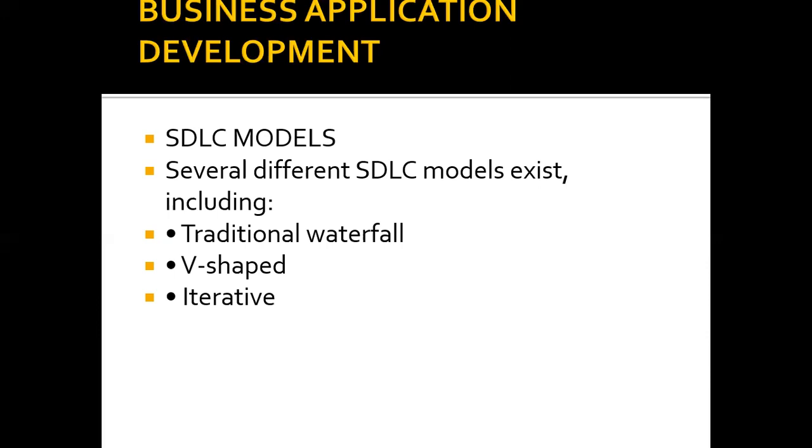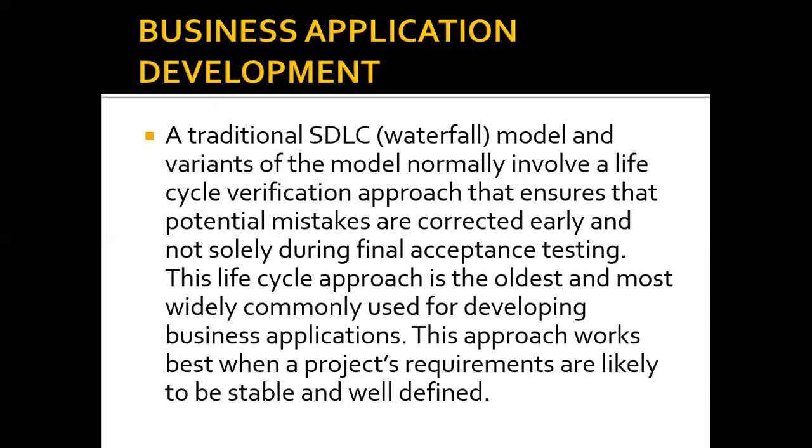All right, because the waterfall model basically works in an environment where there is stability of requirements. So you don't expect a lot of changes in requirements.